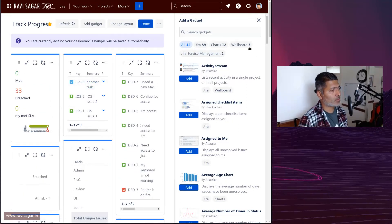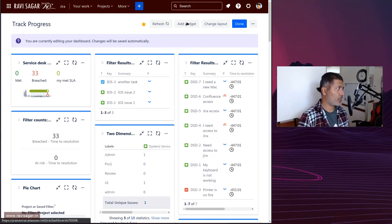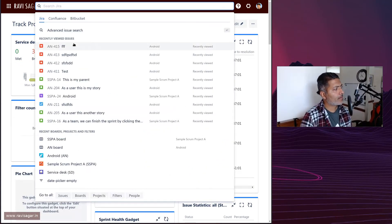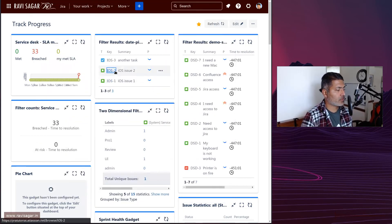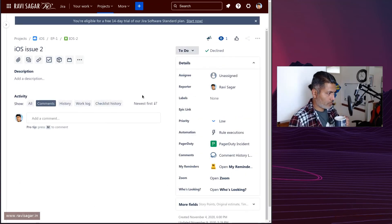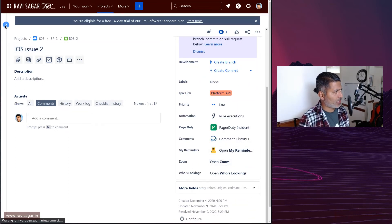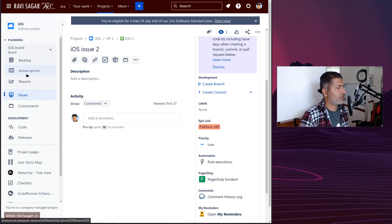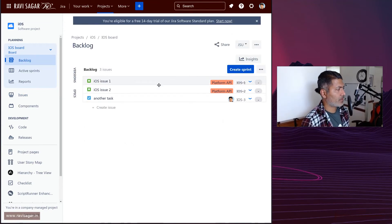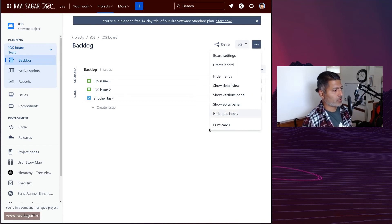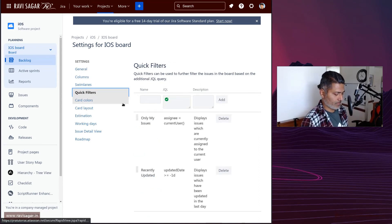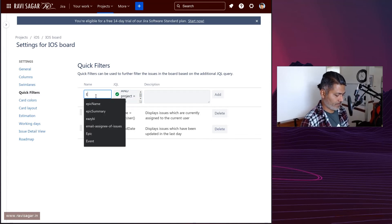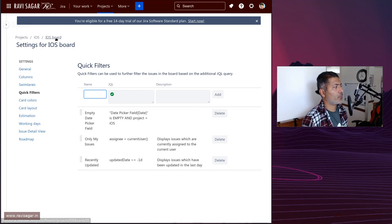We have the list here. We can also do something like maybe you can create in your board, scrum board for example. If I go to my scrum board, let's do that. For example, if I go to my iOS project, let's open one of the stories which is for my iOS project. What I want to do is I want to look at the board which is, let's say, backlog or whatever active sprint board. The good thing about your board in Jira or boards in Jira is that you have the option to create quick filters. For example, if you go to quick filters and if you type in the same JQL: 'empty date picker field', add.